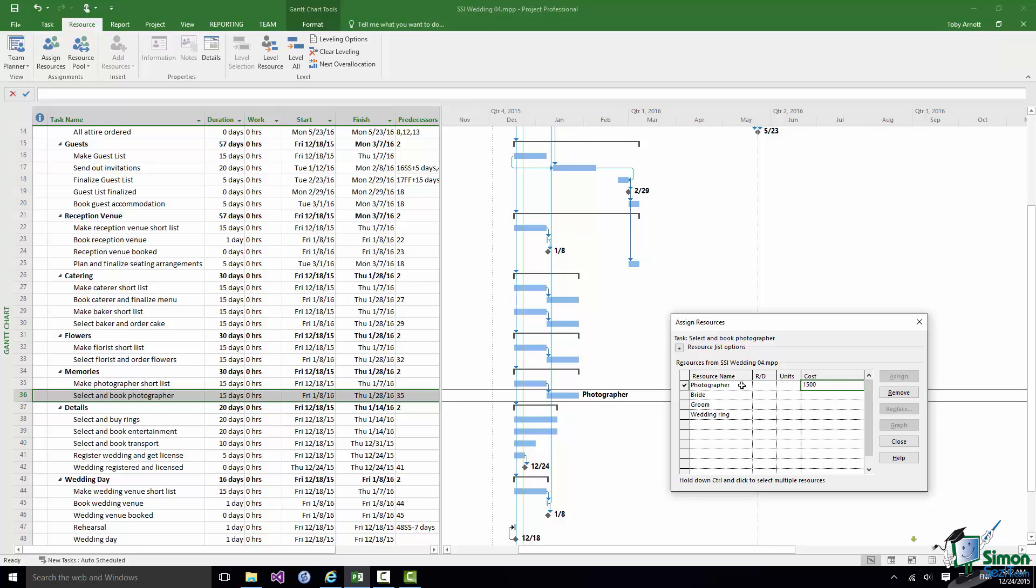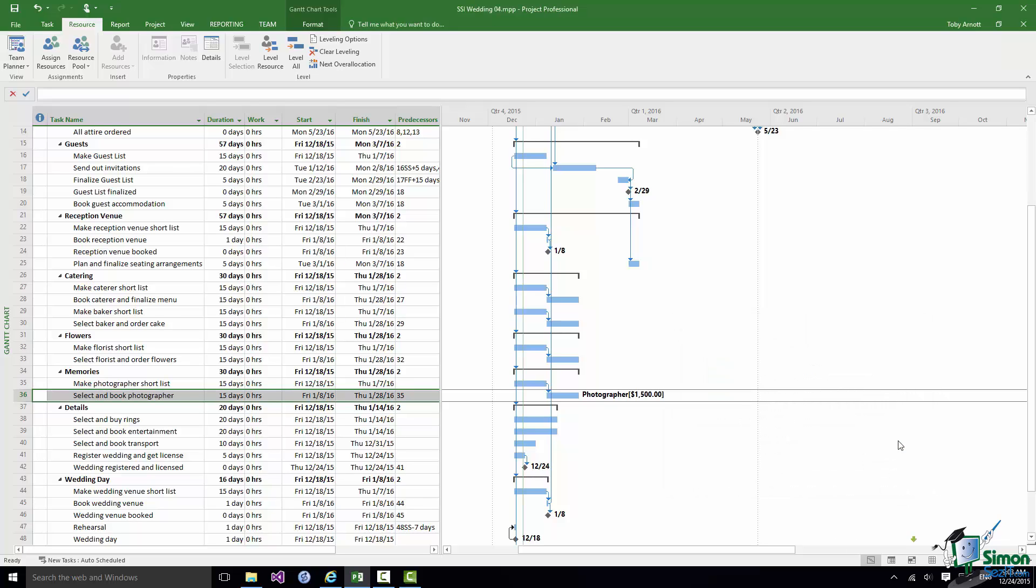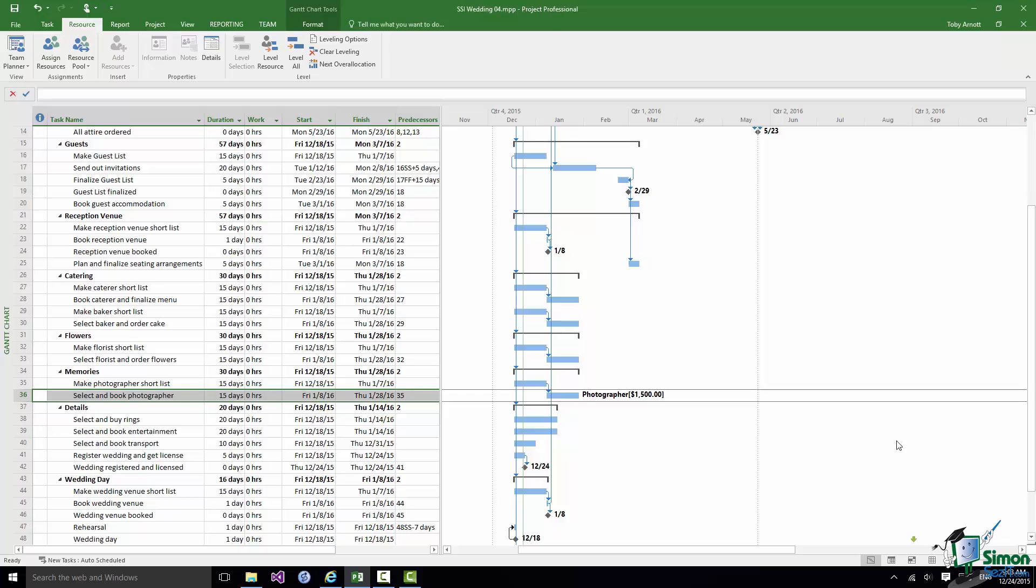So enter $1,500, click somewhere else and we have a cost of $1,500. Having done that click on Close and that resource is assigned to the task. Note how the cost appears in brackets after photographer. I should point out to you by the way that what you see on the Gantt chart on the right, the words to the right of the blocks in this case, this is all customizable and we will be looking at customizing the Gantt chart later on in the course.